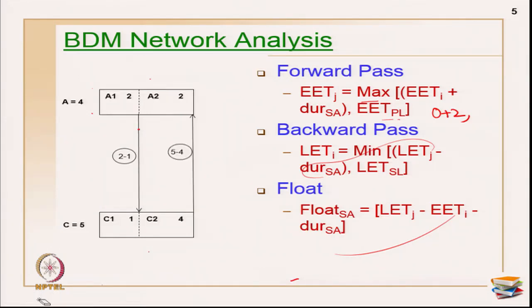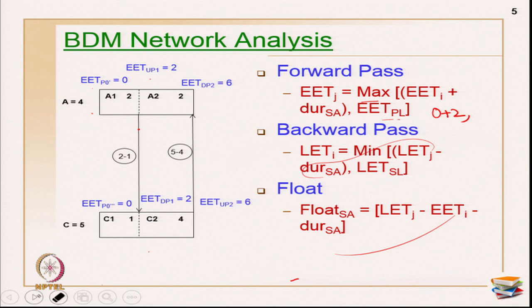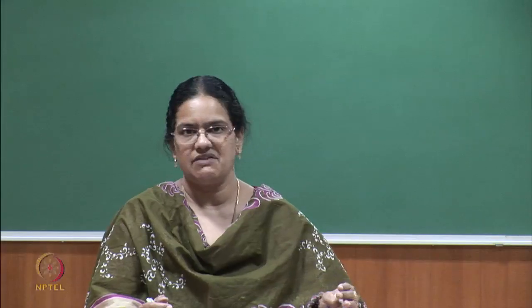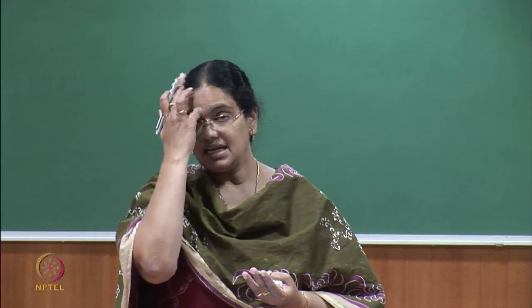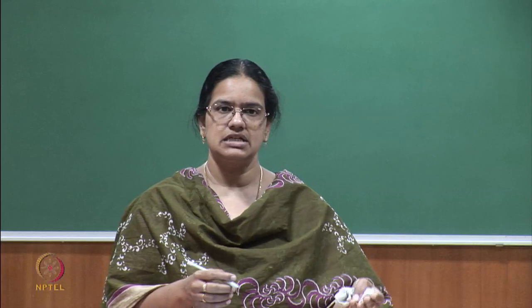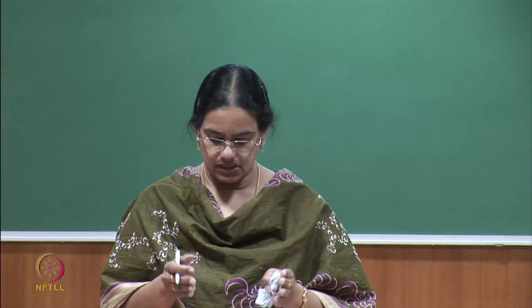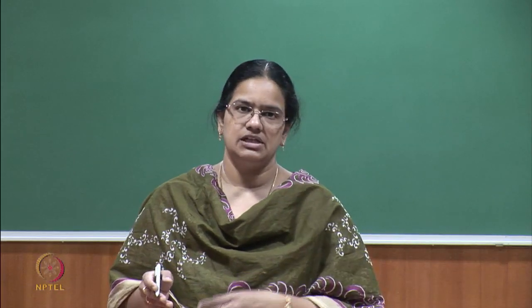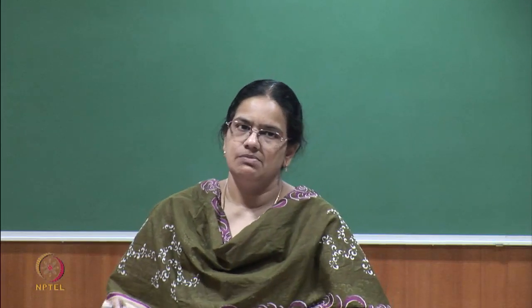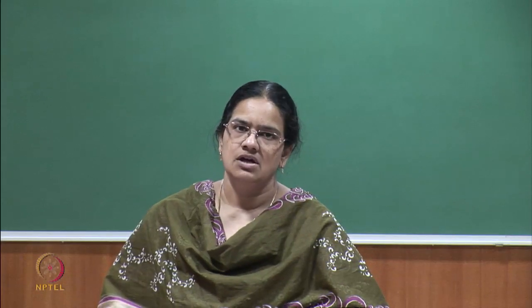You should not have the impression that every time you should only be taking teams and parameters. So far in this example we have seen multiple information links traveling between parties — it can be any link between any two issues. For example, the first example showed parameters traveling with the teams, and in this example deliverables traveling with the teams. It can be any link just like in types of DSM — it can be between teams and components, teams and parameters, teams and deliverables, components and deliverables, or components and parameters. Based on whatever you want, you can accordingly develop different DSMs of your choice.